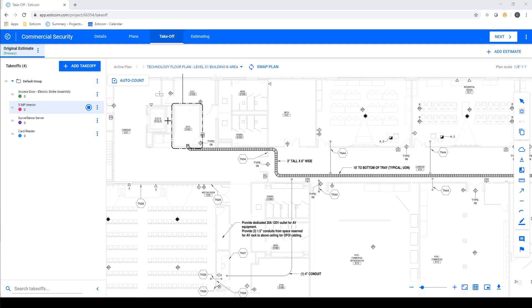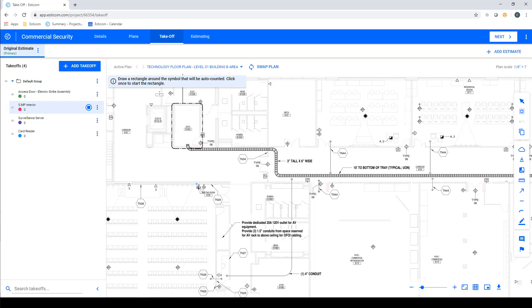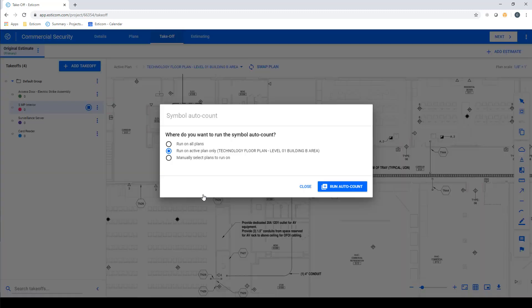Let's go ahead and start the takeoff process by counting the interior cameras. You can go through and manually count one by one by hovering your mouse over the item and clicking, but in this example, we're going to use SDCom's Auto Count feature to speed up the process. To begin the Auto Count process, click the Auto Count icon, and using your mouse, select the area around the symbol. You can use the handles to resize the selection, or if everything looks good, click the check mark.